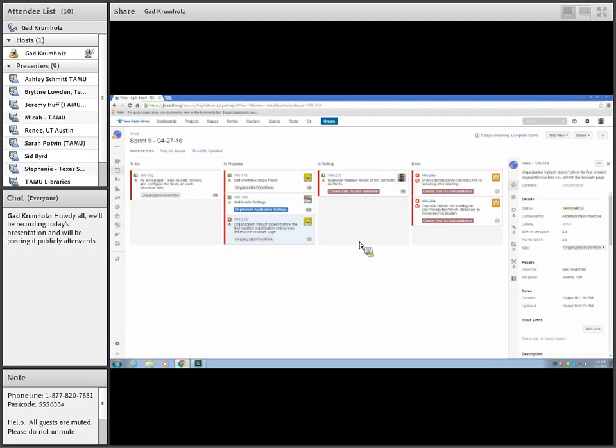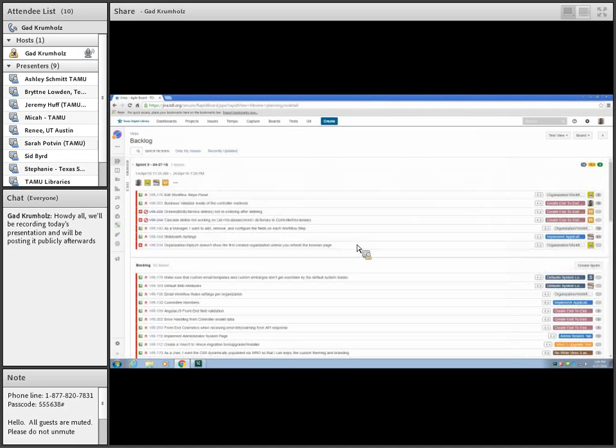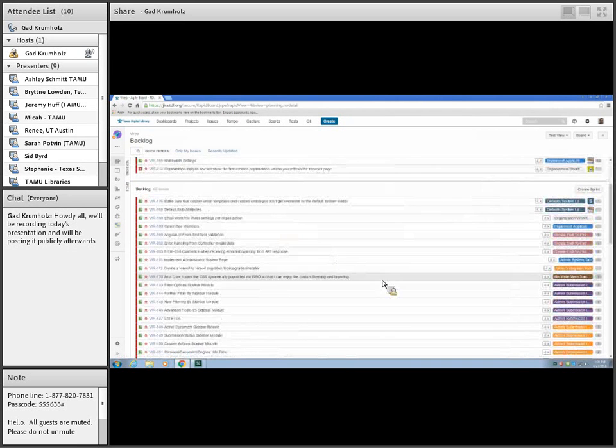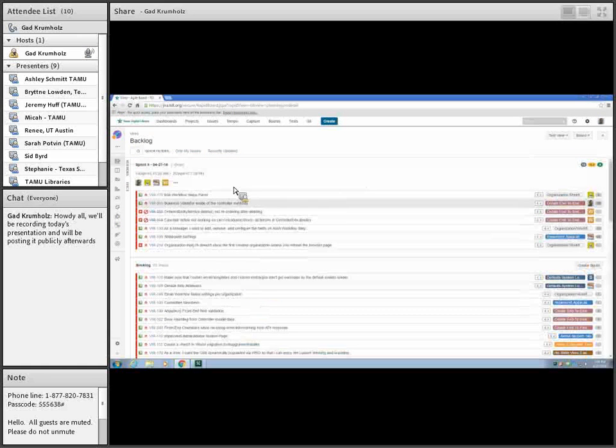When we merge everything, all of these cards should move themselves over to done, and then we'll start a new sprint. We'll go back to this backlog, and we'll pick more stories out of the backlog to throw into the next sprint, and get them implemented. And like I mentioned, those stories will probably more than likely be finishing up the organization workflow UI, and maybe get started on the list of submissions for the administrators.